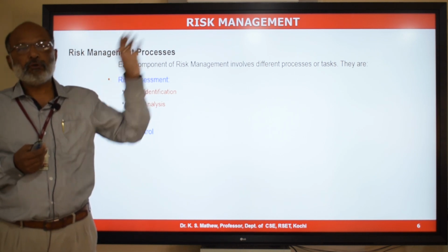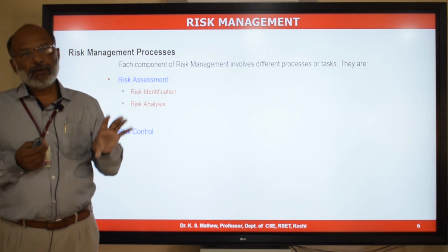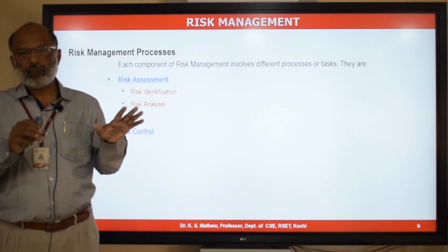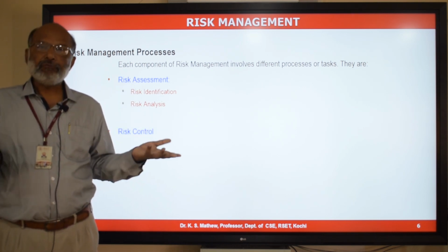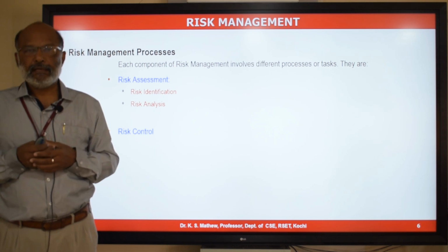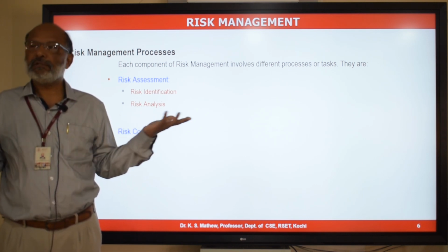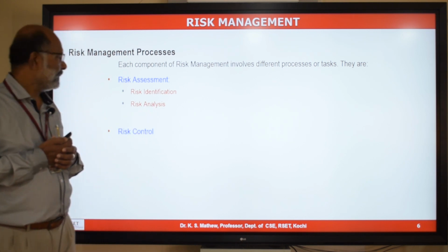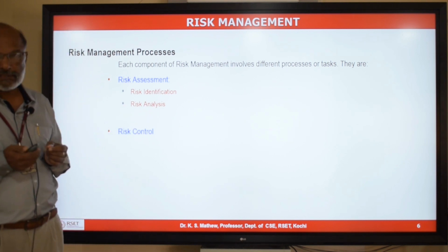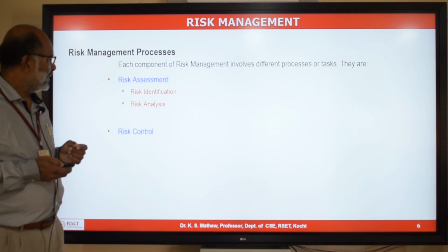Plan actions for only the top priority risk. We will document all the low priority risk and keep it as a watch list, and we may not plan actions for those low priority risks. That's the reason why we need to analyze and prioritize the risk, because there could be hundreds of risks in a project. That's the second process under risk assessment.